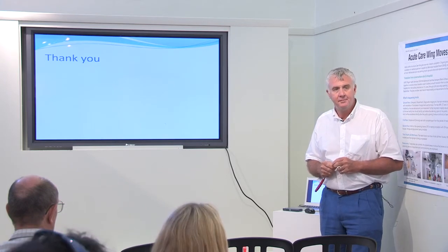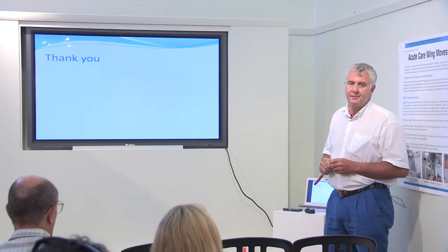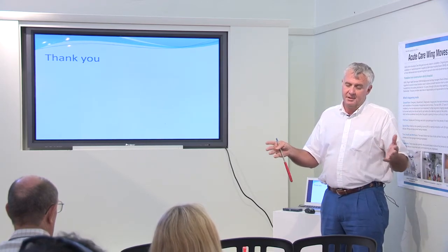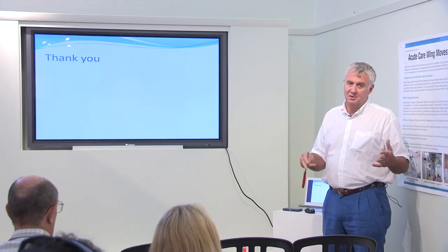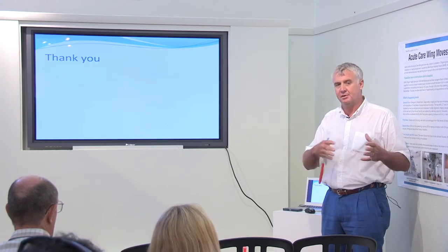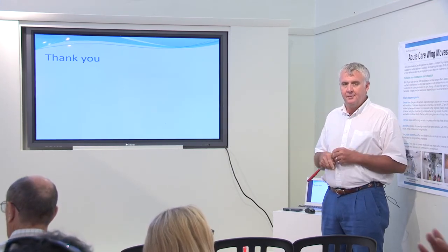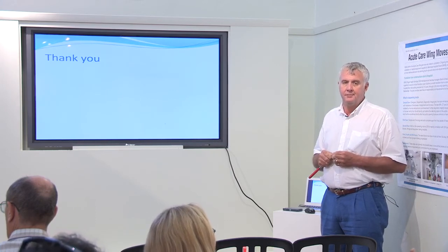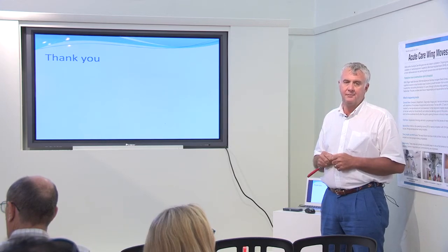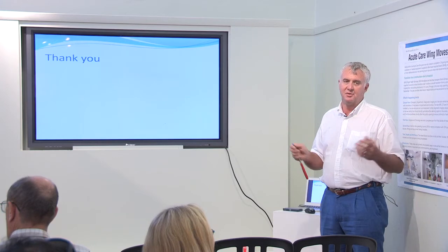So you put a load on it from the old section? Well, there's a load going on it from the old section. And of course there's a new facility, the new acute care wing, but it doesn't suddenly mean we're going to have an awful lot more patients. It's the same people moving, so it's effectively the same load. The load from the existing unit gives you a test, and then you add the other one because you've got capacity beyond that. It gives us a chance to make sure it's all working right.